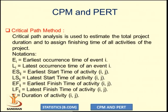To draw a network diagram is an entry point for the Critical Path Method. If we cannot identify all the activities in the network diagram, we cannot correctly find the critical path. Critical path analysis is used to estimate total project duration and to assign finishing times to all activities. In CPM, we use the following notations: EI is the earliest occurrence time of event I; LI is the latest occurrence time of event I; ESIJ is the earliest start time of activity IJ; LSIJ is the latest start time of activity IJ; EFIJ is the earliest finish time; LFIJ is the latest finish time; and TIJ is the duration of activity IJ.